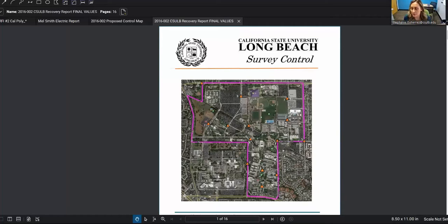And so at that point, we did use the GIS to provide as much information that we have on hand to the subsurface company and tell them, hey, this is what we think is there. This is what we know of according to all of our as-built that should be there. So you could use this as a starting point when you do your subsurface imaging. And then they did GPR, they do contact tracing to accurately find everything that's underground.